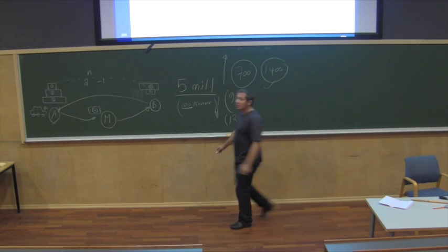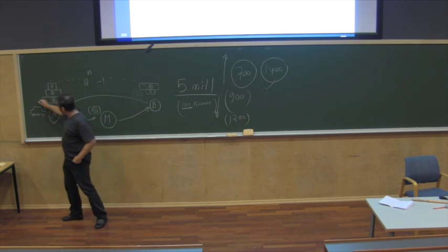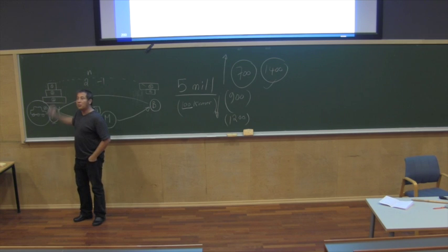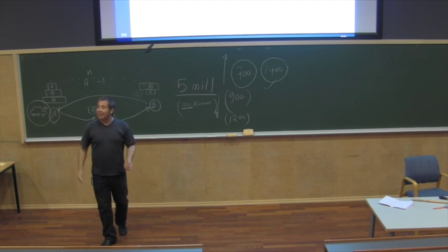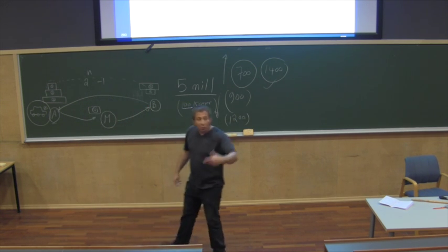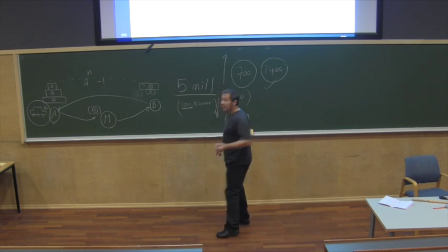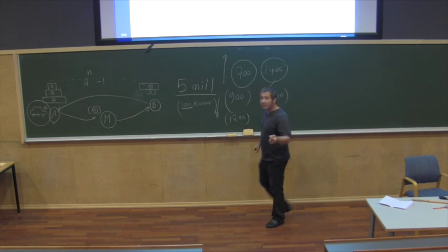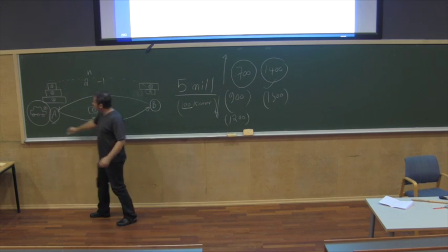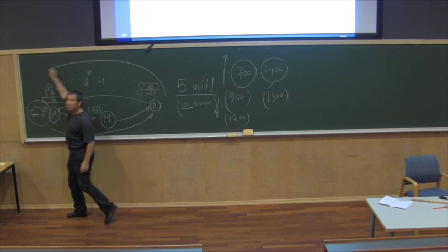When we start the transportation activities here, things could happen, right? Damages could arise, roads could be blocked, waiting time could be a factor, and other technical risk factors that are there. We should also include that in our estimate. And lack of definition. Actually, you said 1400 and I said 1500. It's because I failed to mention to you that after you complete all your transport operations, you will go back to where you started.